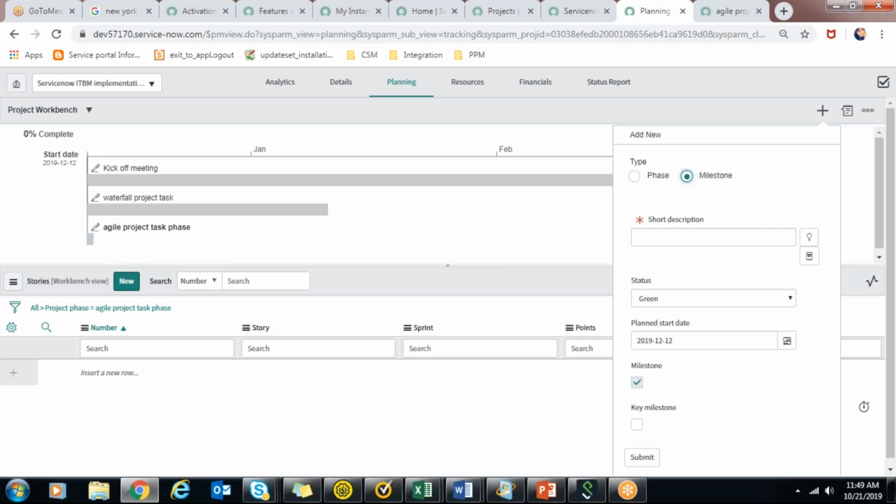maybe in key milestones you define that such payments need to be recorded whenever a milestone is reached. And if it's a key milestone, you are expecting some payment from the customer, you can define that with proper project planning, that if this percentage of the work is done and this key milestone is reached, you will require that kind of payment.